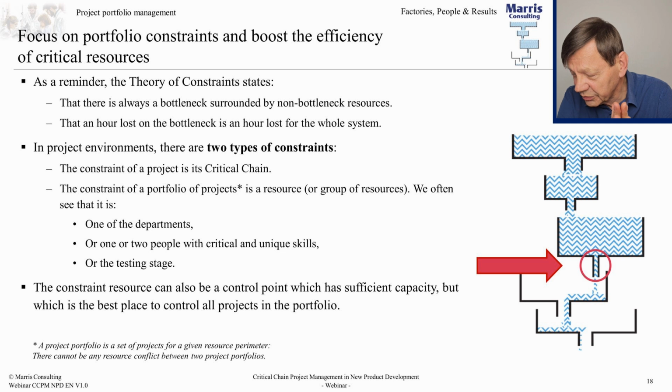Often people are trying, we're in new product development, right? Often people are trying to develop tomorrow's products with yesterday's capabilities. So I can guess before I even visit the company where the bottleneck's going to be, and it's quite simple. It's easy for somebody sitting on the outside to say, it's there. You're trying to develop tomorrow's products with yesterday's capabilities. So you've got probably sufficient mechanical engineers to design the housing, the pipes and whatever. But you're planning to put more IT into your product, more software, and you'll find out you don't have enough electricians or you don't have enough people in software engineering. That's one aspect to be taken into account.